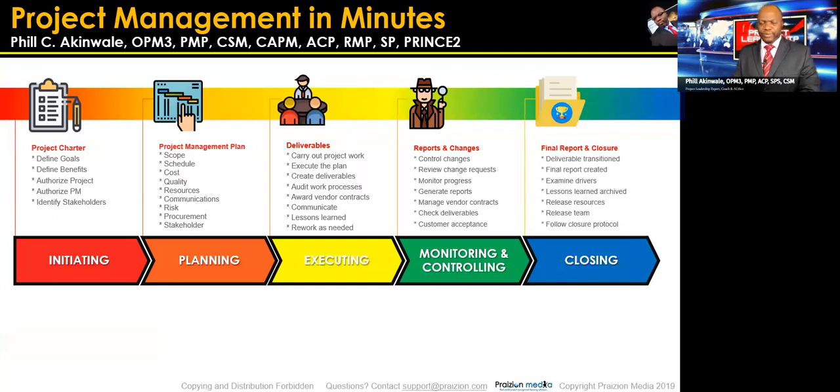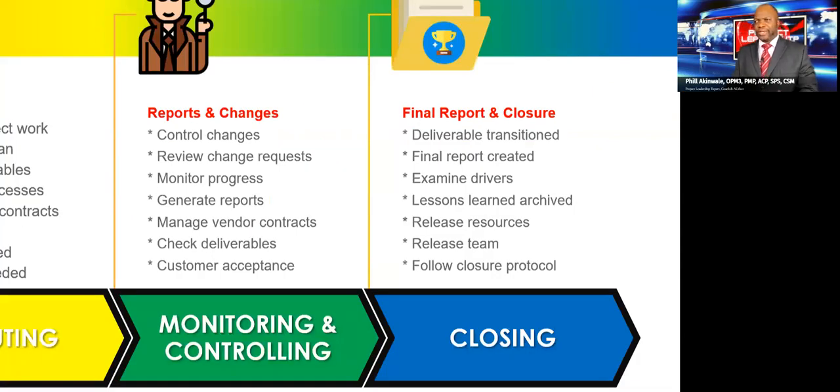In the closing process group, this is where we are involved with the deliverable being transferred to the client. A final report may be created. We could examine drivers of success, carry out the lessons learned, archive the lessons learned, release resources, release the team, and things like that.